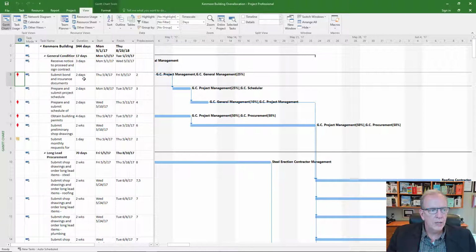Where I would go is, first off, I'd want to know what resource is over allocated. In this sample that I put up here, I purposely put several resources on an activity. Ideally, you want to have one resource on an activity. That's probably the first rule as a best practice, because if you have an activity, it's best if you can hold one party accountable for that. In certain situations, it may not make sense to do that, and so in those cases, like here, I've got several people on the same activity. They would be working collaboratively on this particular activity.